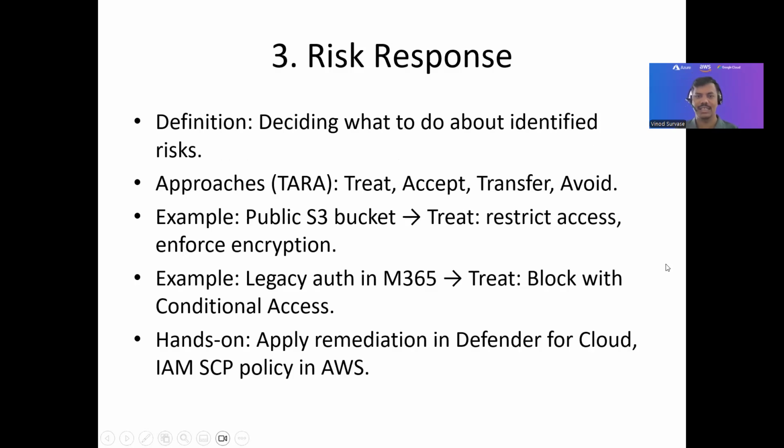The next is risk response, right? So how are you going to respond to those risks? You would be deciding what to do about the identified risk. What steps should you take? What actions do you need to take in order to mitigate those risks? At the same time, you also want to keep the integrations and implementation intact so that it does not impact the business, right? So you would take different approaches, including treat, accept, transfer, or avoid.